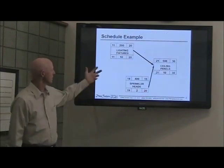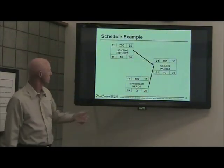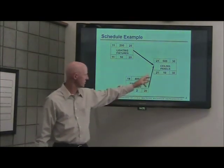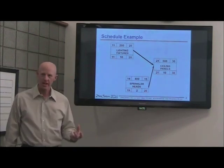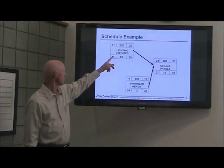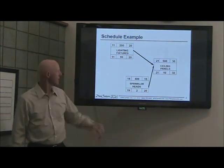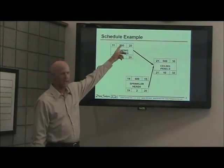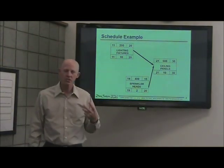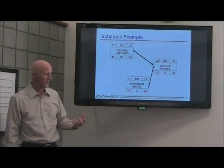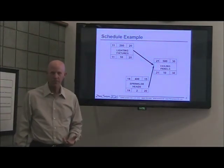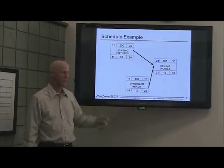Let's take a look at a real small piece of a major schedule. I'm showing three tasks: lighting pictures, sprinkler heads, and ceiling panels. The way this is set up, you have your early start, late start, early finish, late finish, duration, task number, and the name of the task. This is a pretty standard nomenclature to use for task boxes when you do scheduling. It is not the default of Microsoft Project, but it's easy to change so it looks just like this.